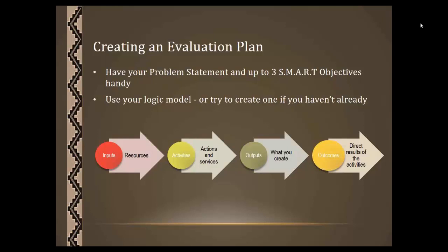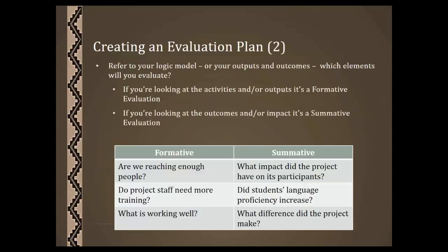And when you're creating your evaluation plan, you want to refer to the logic model and look at the activities, the outputs, and the outcomes you've identified to determine how you will assess if you've accomplished them or not. When you're creating your evaluation plan, again, have that logic model handy if you have one, or take a look at your outputs and outcomes. Which elements are you going to evaluate?